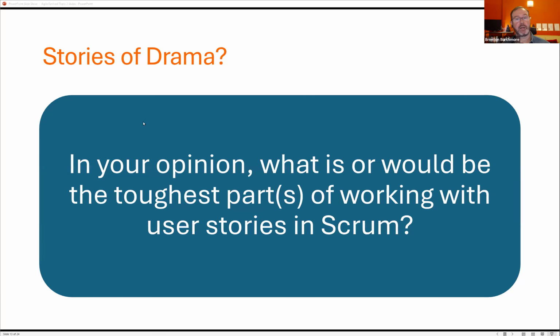Okay, so these are scaling questions, and some of this we'll explain more in week 4, but the short answer now is most generally people are only in one sprint team at a time, but there might be teams of teams, and there might be teams where one team is working on this and another is working on that, but they're going to work together at the same pace. And usually, no matter how big and how many teams you have, everyone's working on the same rhythm, on the same pattern. Because let's say, for argument's sake, 2-week sprints, and this team gets together every 2 weeks and this team gets together every 2 weeks.